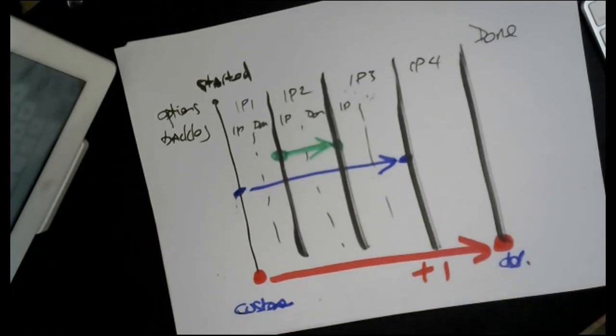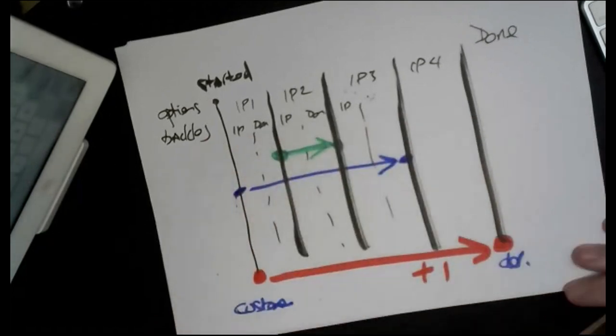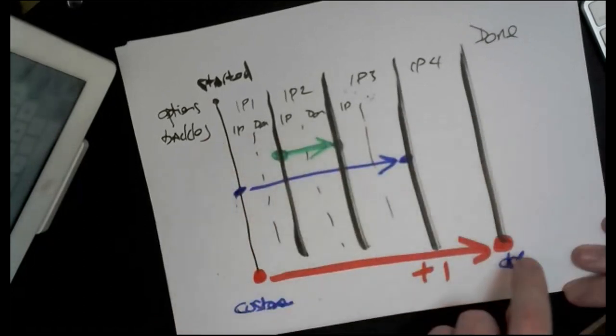In the addendum, you'll see a visual from the Tameflow book. Also, I think Andy Carmichael had some involvement in that diagram as well. Essentially we show all different types of cycle time: customer end-to-end cycle time, lead time, all different types of time in process, all that kind of thing. But essentially in your workflow, you'll have a number of steps and you'll decide there's a start point, there's an end point, and that's your cycle time.